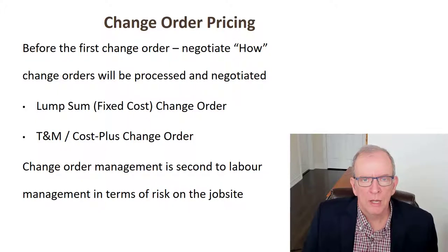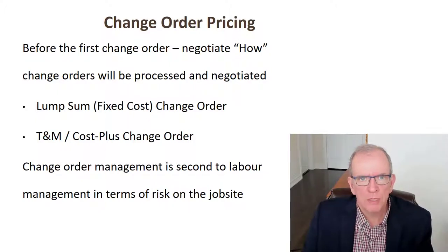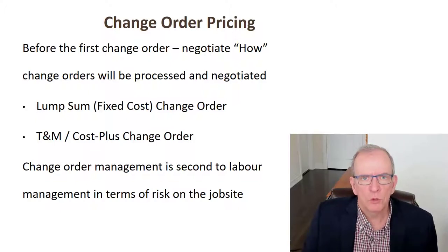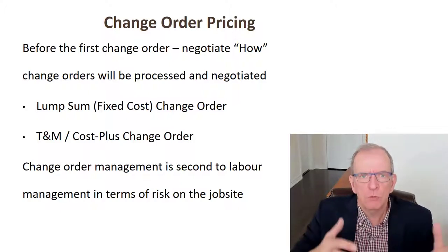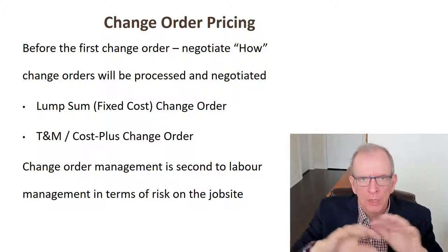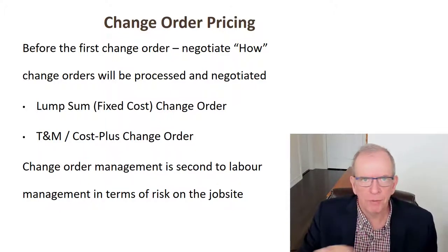Generally, you want to give a lump sum price for the change, but for certain components of it, you may have to do what we call a directive change or directed change. And change directive, where you're actually directed to go ahead with it even though you haven't got the final sign off on the change order, because the price is currently being worked out.